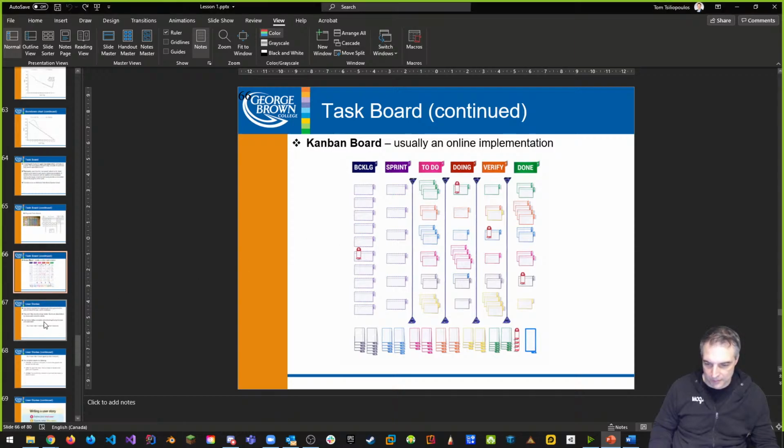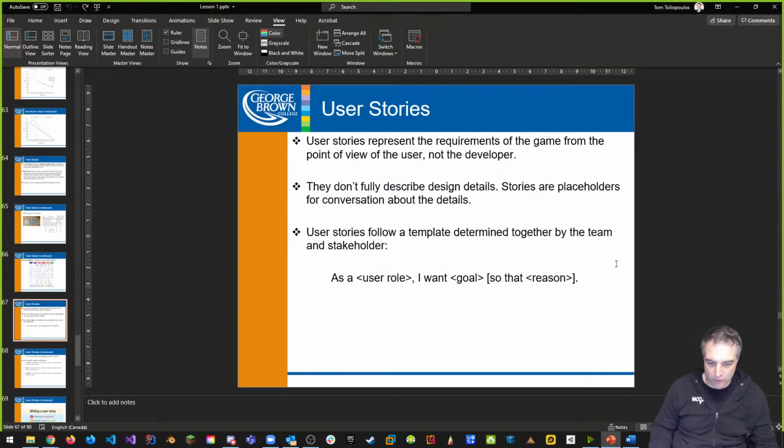All right. As we go forward, we want to write our tasks in the form of user stories. This is, again, a great overview, like really high level is what I'm saying. So as a user, this is how we do it. I want to do whatever I want to do. For example, as a player, I would like to see how I'm doing in the game in terms of health so that I know that I need to go heal myself.